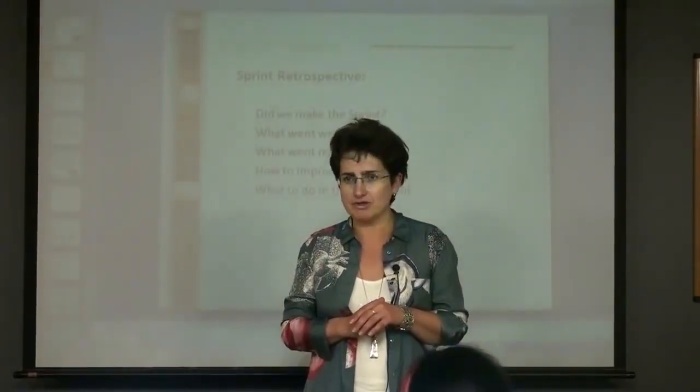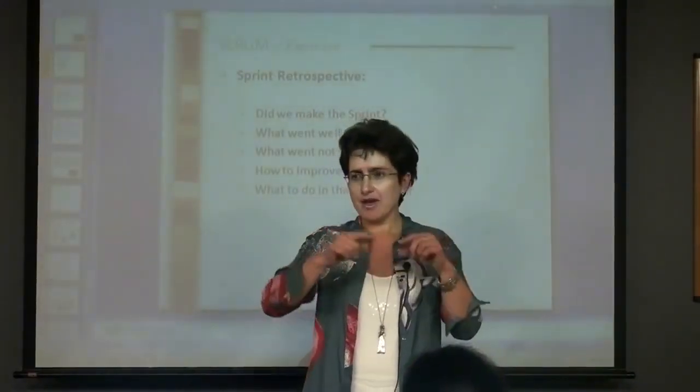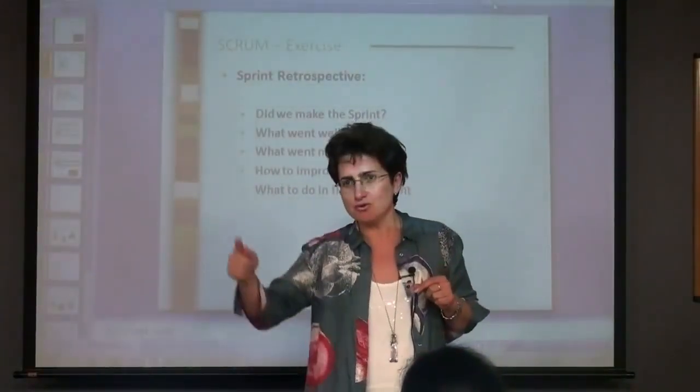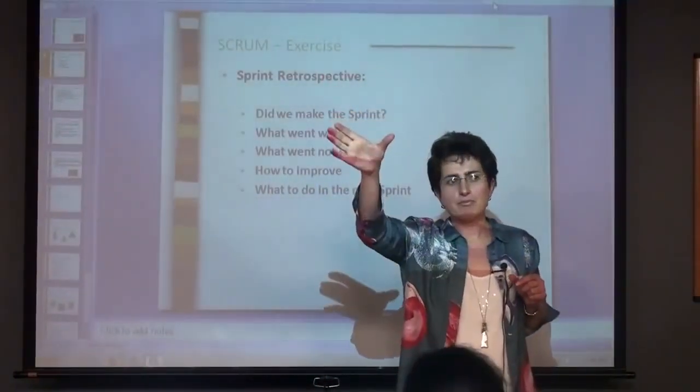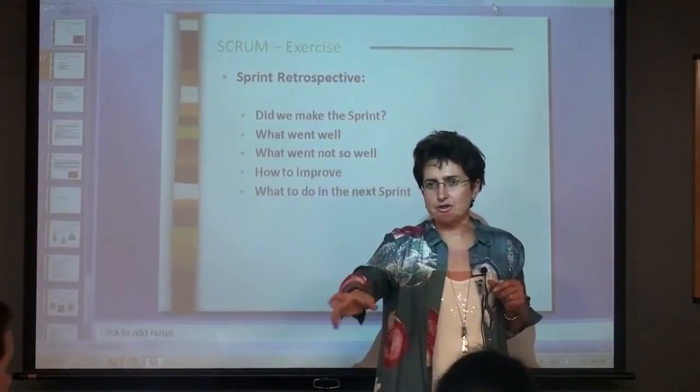So, this is a legitimate question. If you have multiple teams, and you're doing multiple Scrums in different teams, what people do, they sometimes call it Scrum of Scrums. Each team goes through its own set of iterations or sprints, so you have the Scrum process applied to a particular set of features.